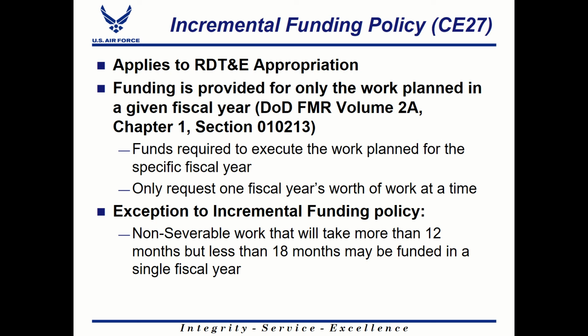But when we do a cost estimate, we want to segregate our cost estimate by fiscal year, government fiscal years, which runs from October through September of the next year, in order to account for that fiscal year cost or fiscal year chunk incrementally.